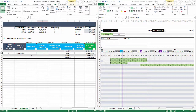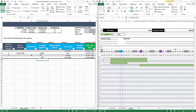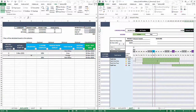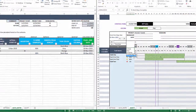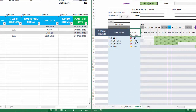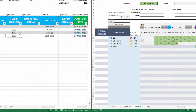The Gantt chart won't show actual data until you change the settings to display actual. Once you switch to 'show actual,' you can see Task 1.1 starting from November 5th through November 19th and Task 1.2 finishing much faster. You can also display 'actual versus plan' together to compare where tasks started late or finished early. This is all instant — just a few inputs in the data entry sheet.